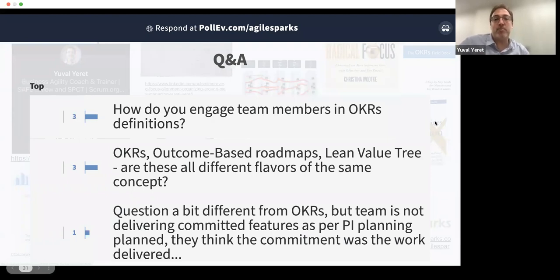So similarly to sprint planning, where the product owner brings in a draft sprint goal, the team is figuring out what's possible. And it's a negotiation around what's the sprint backlog and what the eventual actual committed sprint goal would be. A similar conversation can happen in the context of OKRs, even if we're not using Scrum. It's just that this way of engaging people is useful.